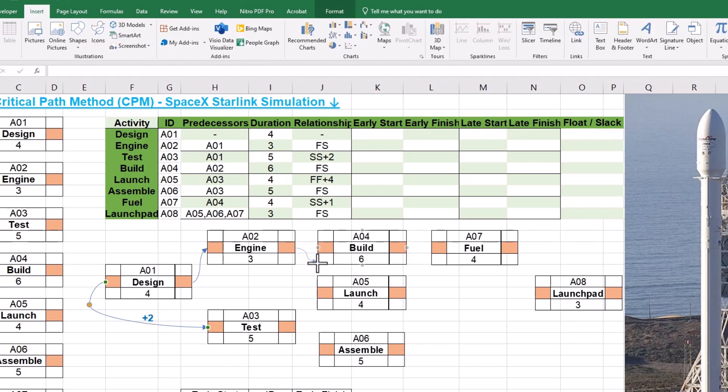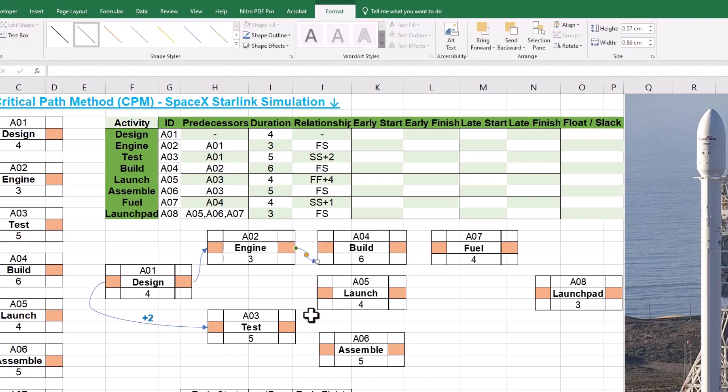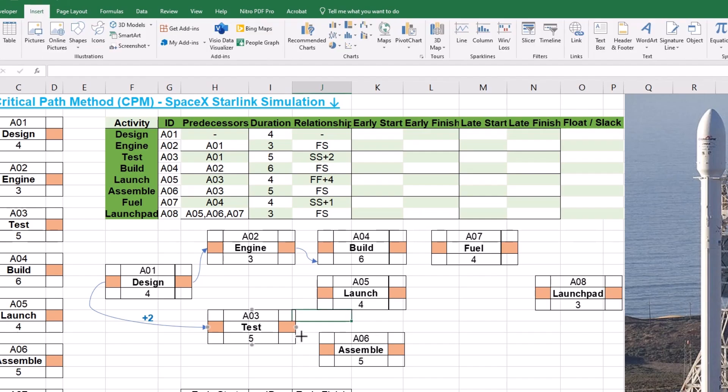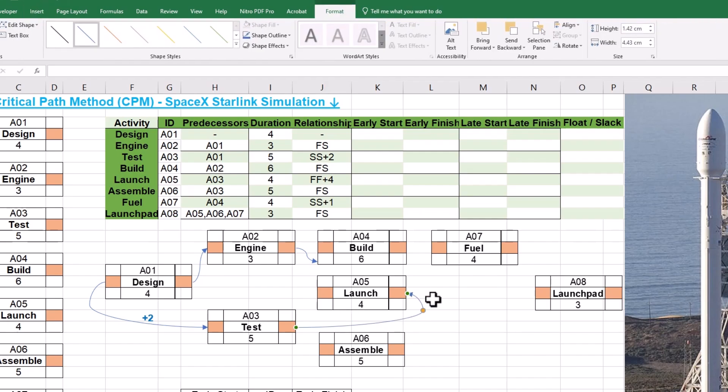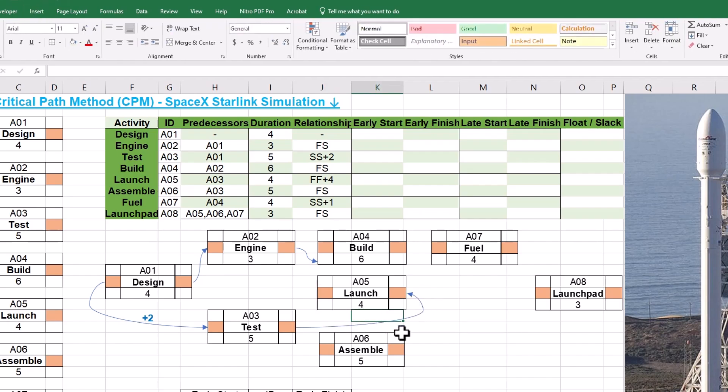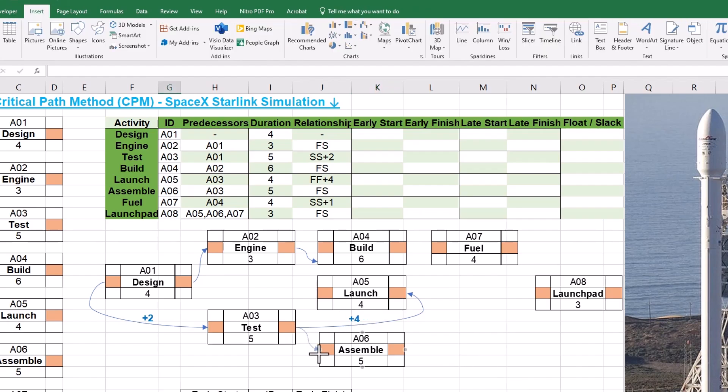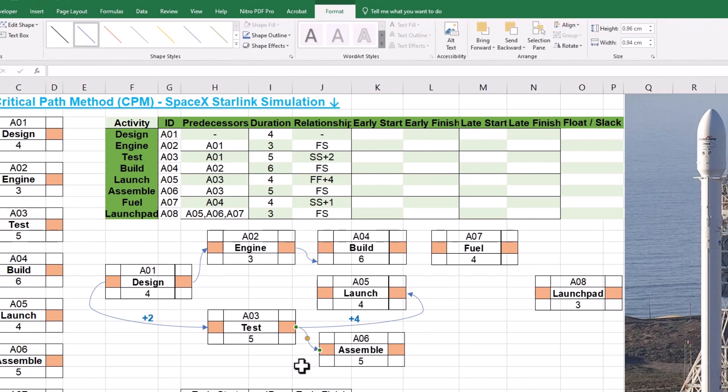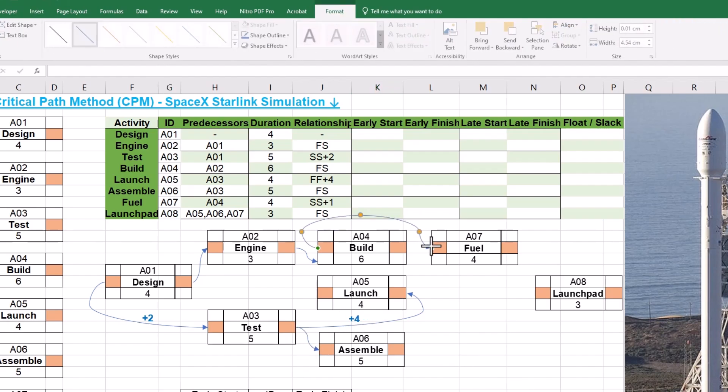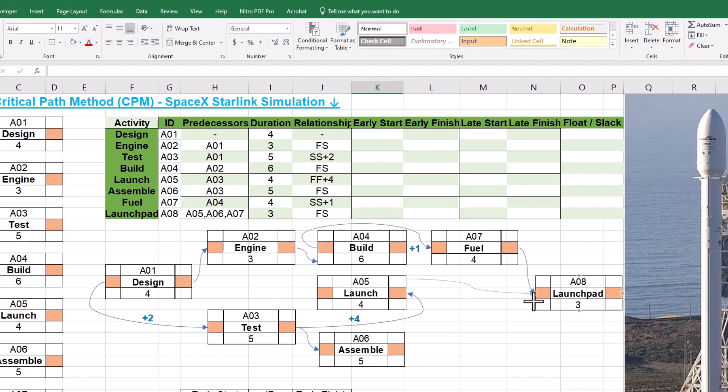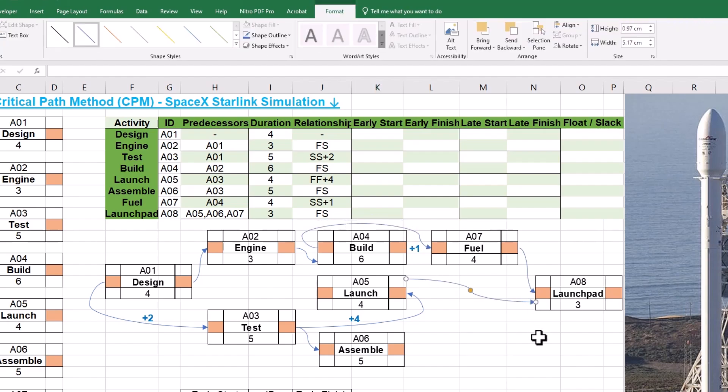The next activity is A4 and its predecessor is A2 with a Finish to Start relationship. Then it is A5 turn, which is dependent on A3 with a Finish to Finish or FF relationship and a Lag of 4. Insert an arrow to connect the Finish of A3 to the Finish of A5. You may specify the Lag on the arrow. Similarly, continue with activities A6, A7 and A8 to animate dependencies by placing relationship arrows.